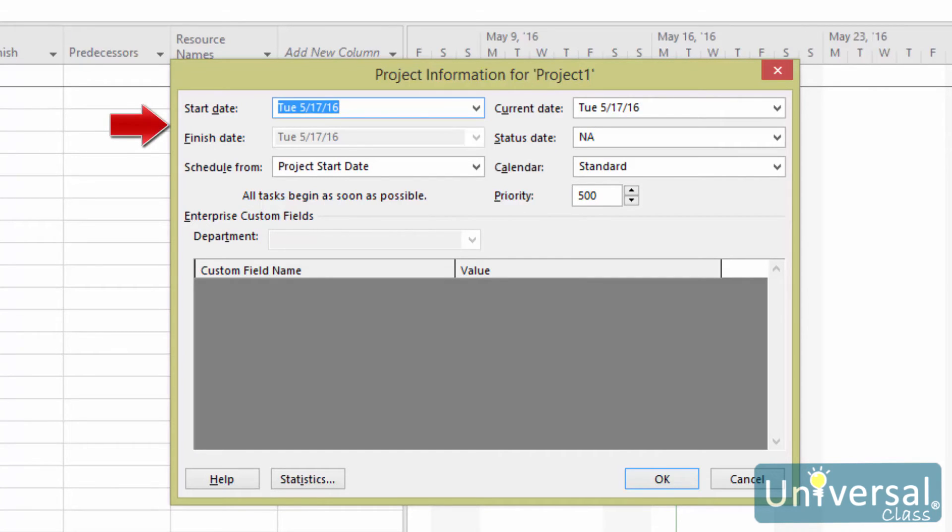The start and finish dates. If your project is scheduled forward from the date it starts, only enter the start date. If you are scheduling back from the finish date, for example, scheduling to meet a deadline, enter a finish date.